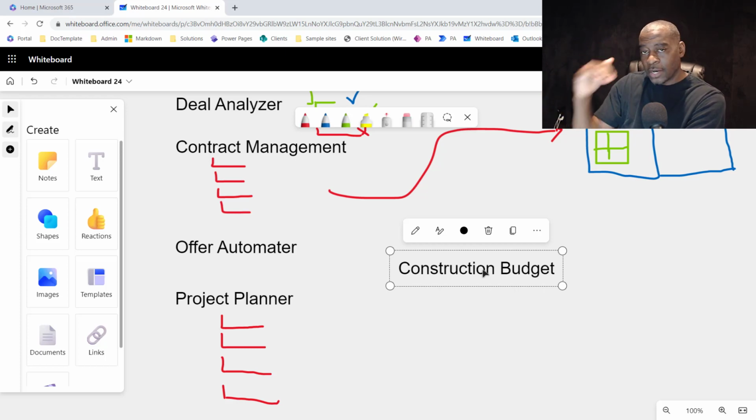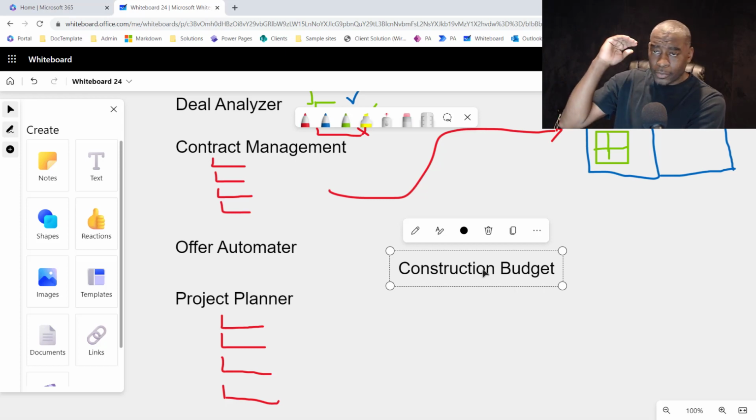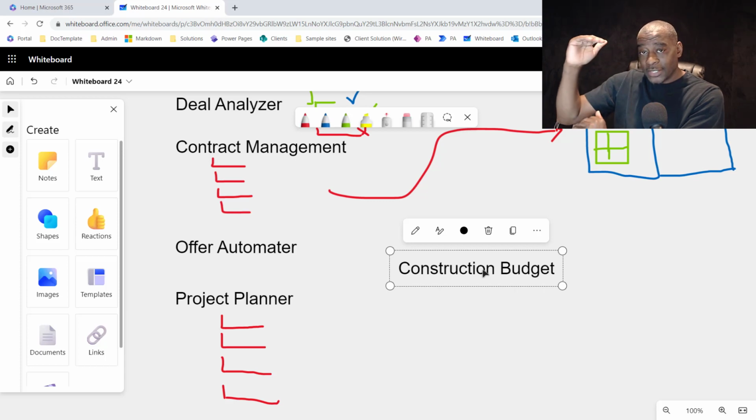So you list out all the rooms within the property, and then you go through with a very detailed list of how many switches, how many plugs, the pipes you're replacing if you're doing the upgrade, the electrical you're replacing if you're doing the upgrade, and so on.